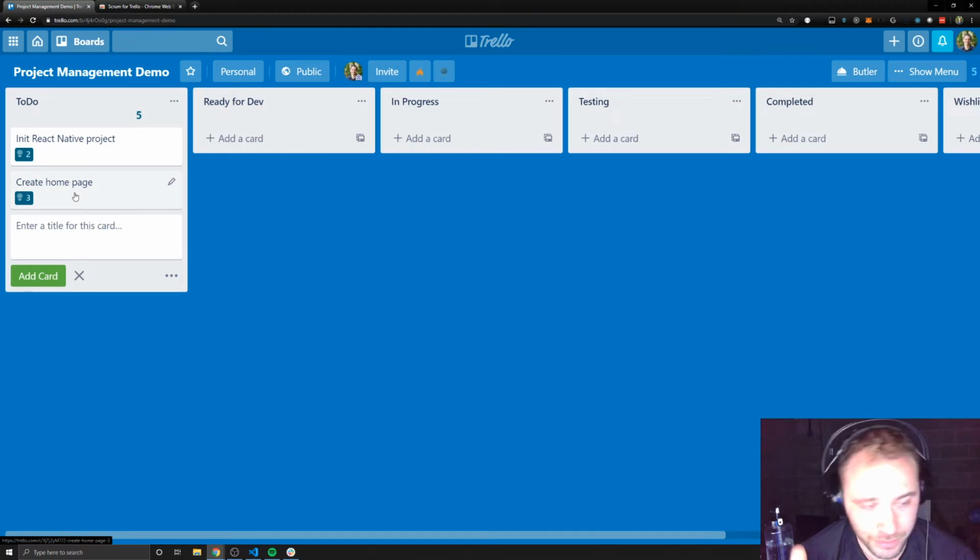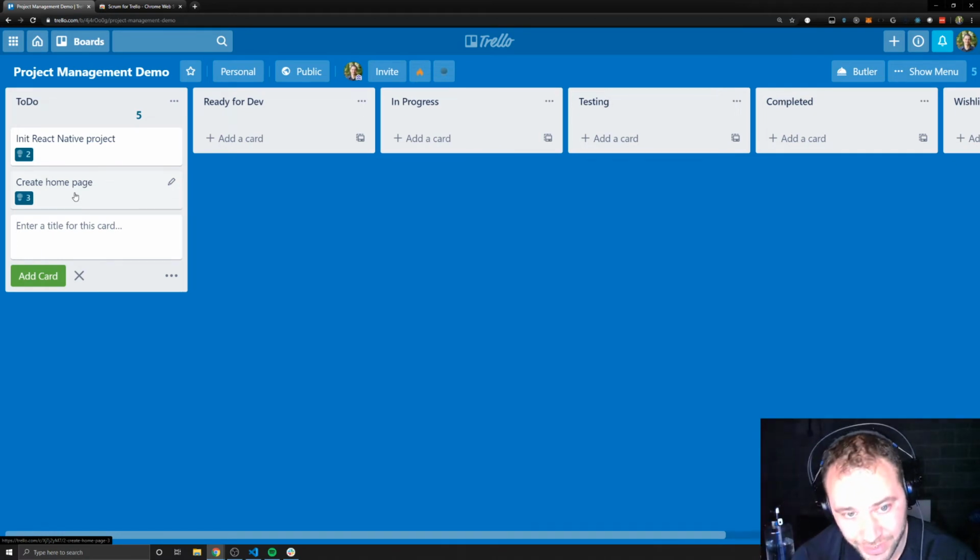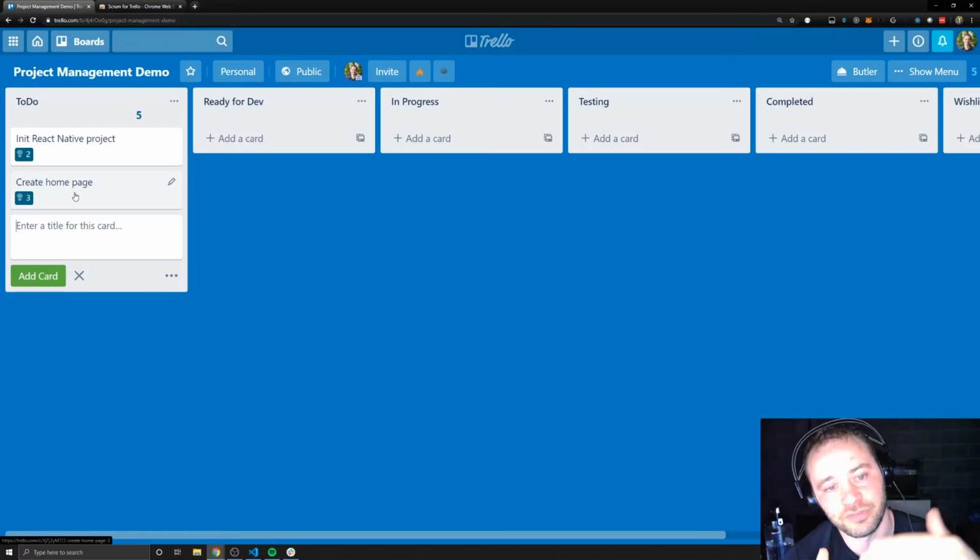The reason being that when you're trying to estimate a task, the larger the task, the harder it is to estimate accurately, which is why Fibonacci is helpful, because if you do start to estimate larger tasks, it forces you to go up several numbers, right? So it almost has a built-in padding that assumes that you're going to estimate wrong.